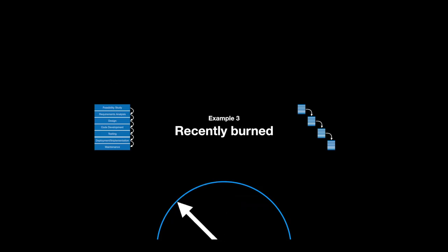Well, a waterfall approach might appeal. After all, waterfall demands thorough and clear agreement on requirements and scope up front. However, taking a waterfall approach puts a lot of pressure on the company's BAs to scope and estimate correctly at the beginning, with big costs for discovering new requirements later on, say in the testing stage.